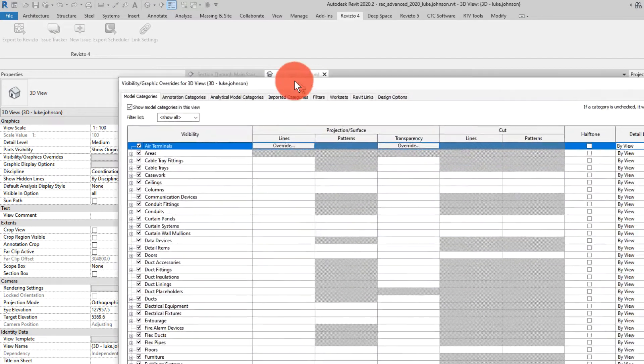Let's now look at the switchback functions between Revit and Revisto. Let's assume we are reviewing various things in Revisto. As a model reviewer I may have some comment about an element, so I create an issue around that element with the Create Issue button and provide some appropriate markups. This issue then gets assigned to the Revit modeler. As a Revit modeler I open my Revit model and click the Issue Tracker. The effect is that Revisto and Revit are now essentially in sync.